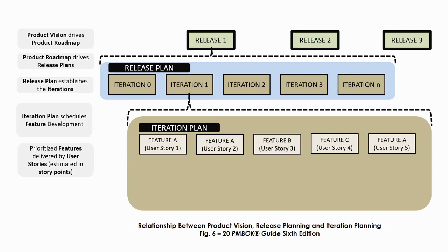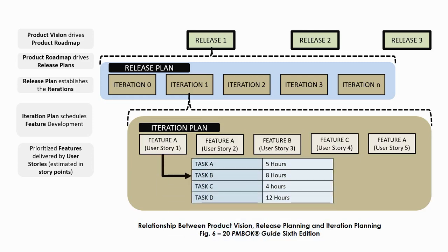So based on the effort needed to complete the work, we can estimate based on story points the magnitude of each of these user stories. And ultimately, we break down these into tasks. So the tasks are estimated in hours, and these give us an idea of the time that is required to deliver these user stories. So all of this information is new to a lot of folks, but those of you who have been into the world of Scrum and Agile probably already know this.